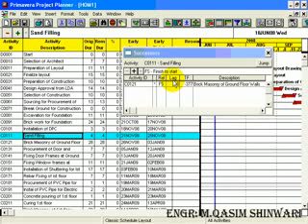Here you can see that a separate column is present for lag. If you want to start two activities at a single time, but you want the successor to start 1 day after the predecessor, let me explain it with the help of some slides.